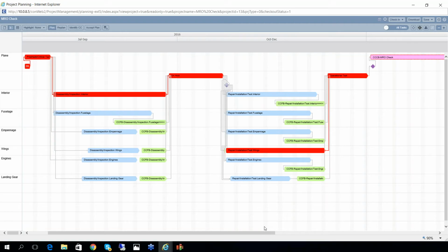If your critical path is changing every day, it means the task priorities are changing every day, and it means you are actually forcing people to multitask. But if you can hold the critical path stable, that means you can hold the priorities stable, and that means you can allow people to focus and finish what they're working on.